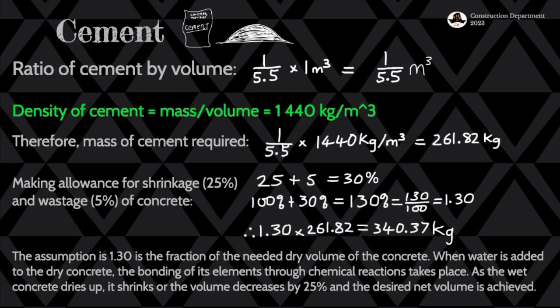Usually you can get 10%. But let's suppose we are very particular about not wasting. Maybe our construction company is very good at managing workers, making sure there's no wastage of materials, so our integrity is to be trusted. We'll just put it at 5% so that the price for our bid will be a bit lower than for other contractors. That's the assumption we're going to be making.